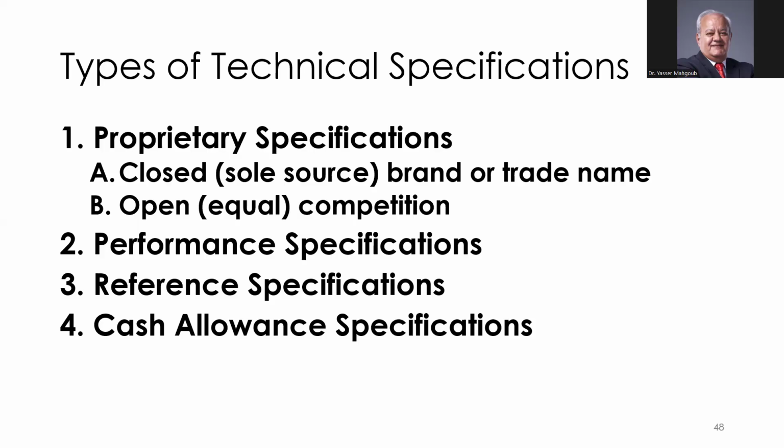Instead of giving the contractor exactly what they should do, I ask them to make sure that the product will perform as I need it, and leave the specs more open. Sometimes this provides the contractor with a more creative opportunity to show their work.